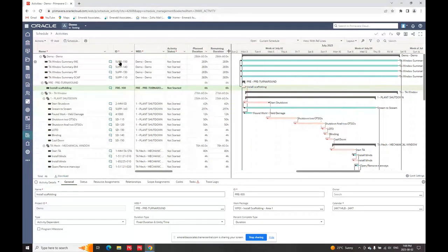What we're looking at here, Nicole was speaking about what you usually have if you're a P6 user. Well, this area would cover off basically what you would see in your P6 schedule. Now, if you have information, whether you were using P6 and you're going to OPC, or if you're getting information from a subcontractor, you can import XML and XERs right into OPC.